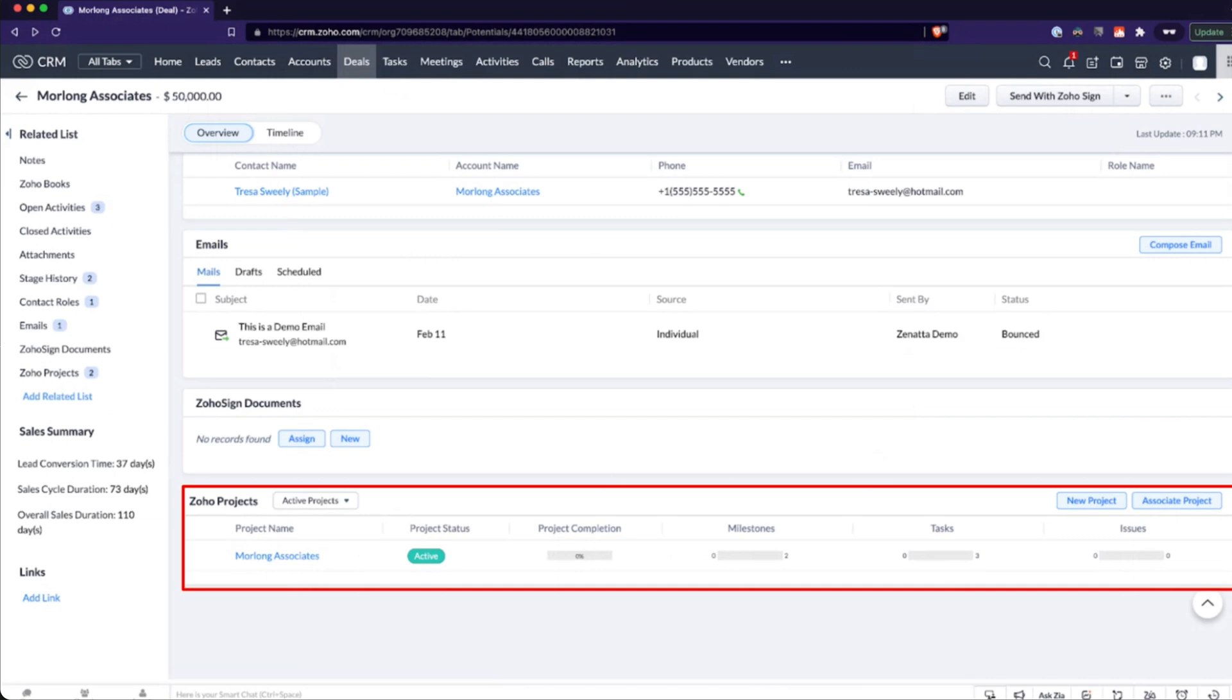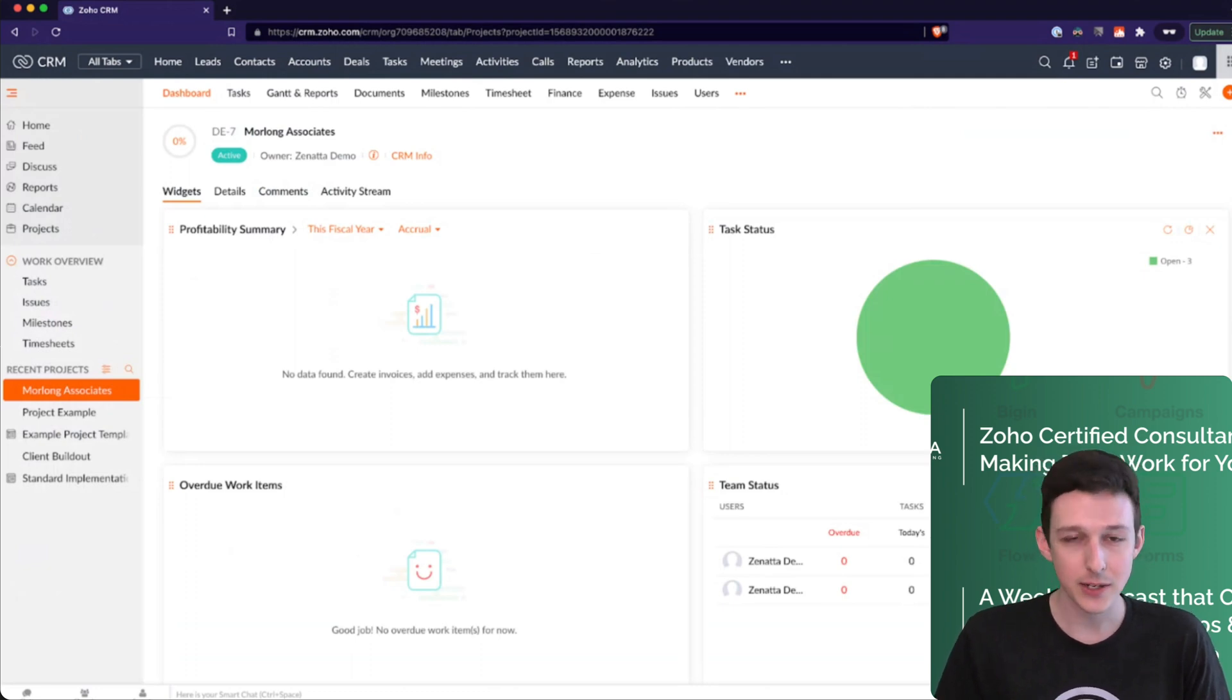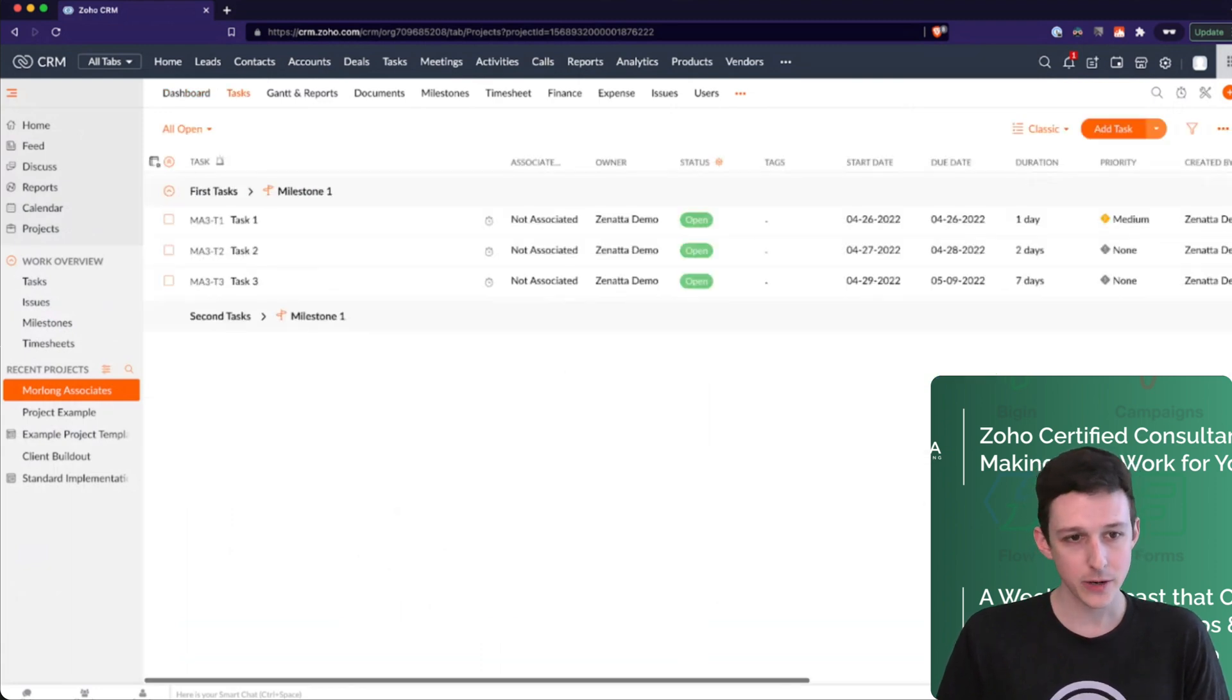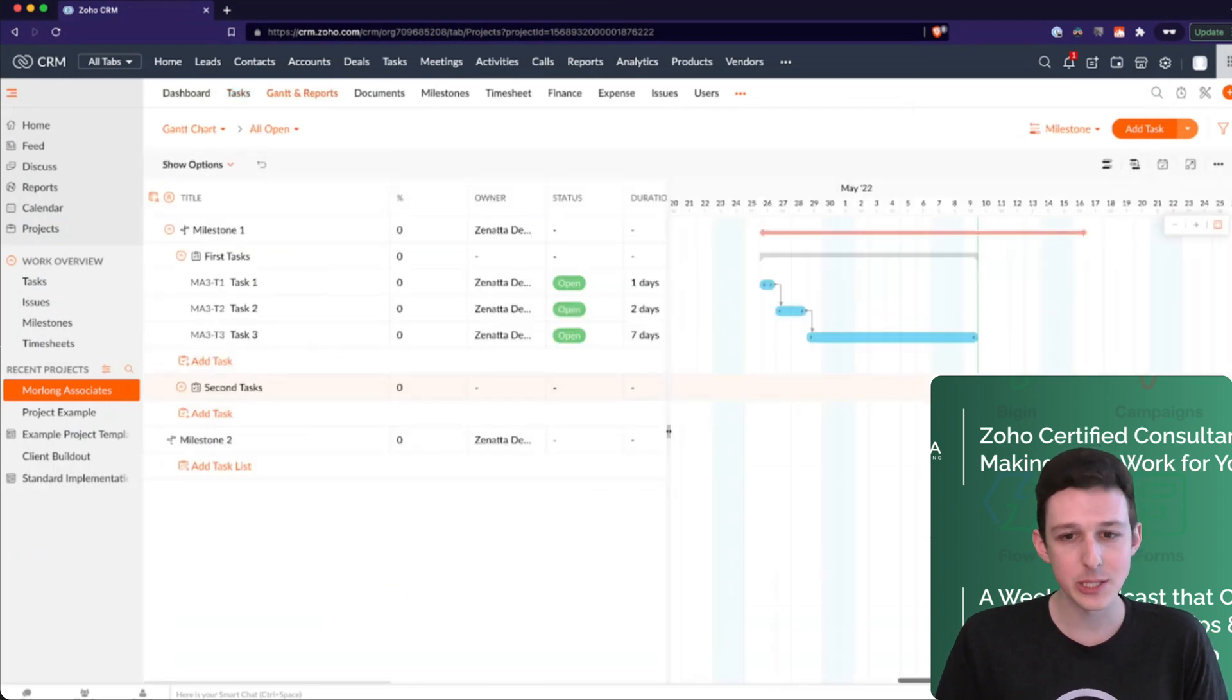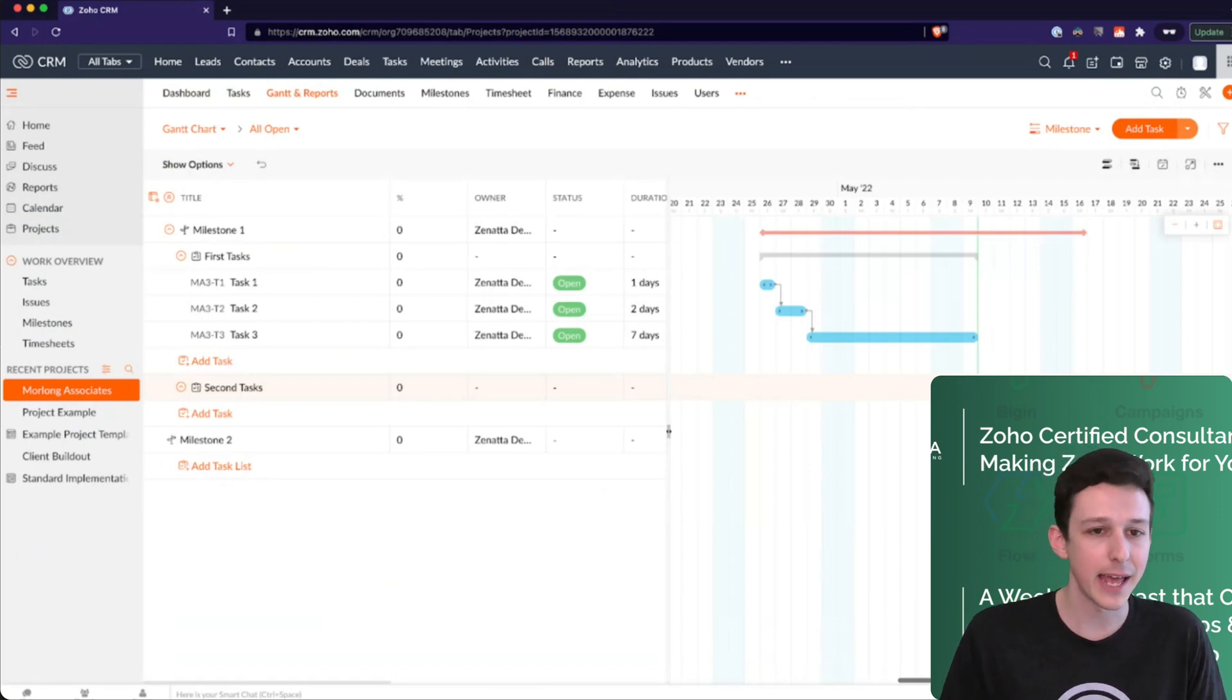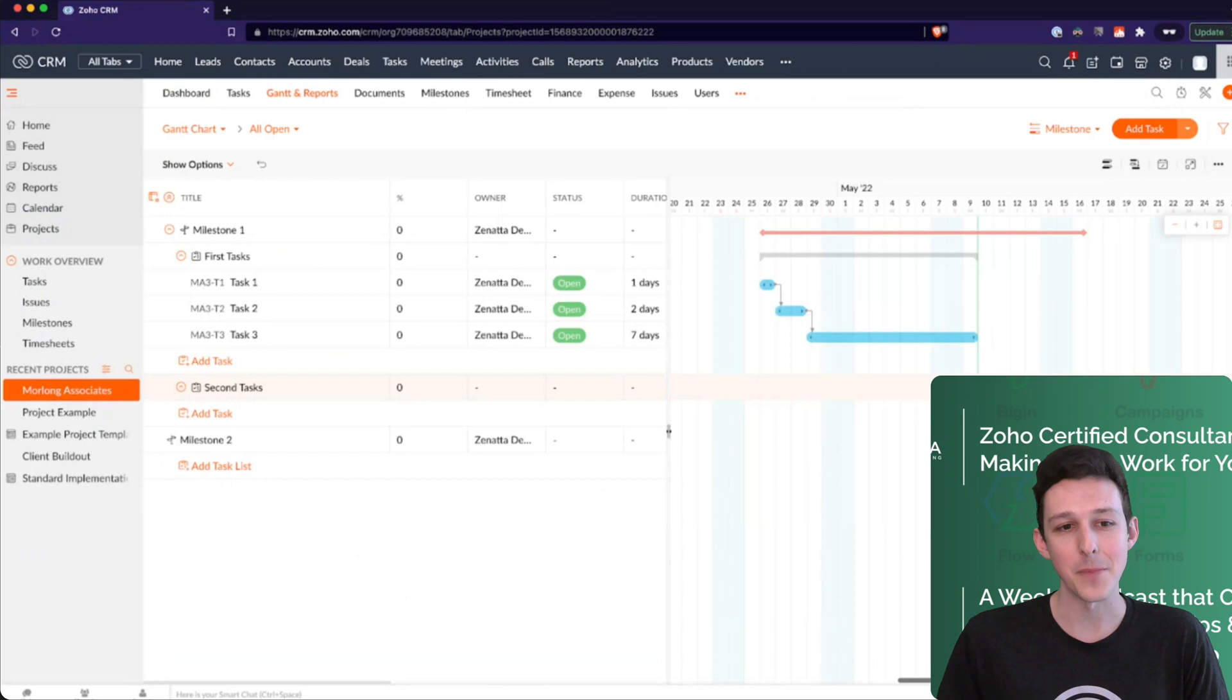If I click through that Zoho Projects tab, we'll actually see that it opens inside the CRM. So technically people don't have to go to a different URL to actually get into this and start working. Here, all of our tasks have been generated again based on those dates that we've specified in the deal, being that closing date of the 26th. And then it's generated our full Gantt chart and task list for us just automatically. Again, all just pulling from that template.